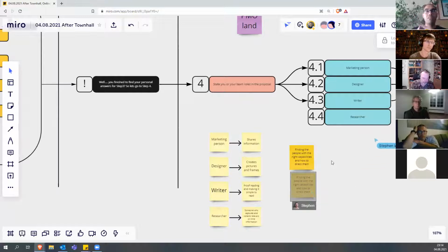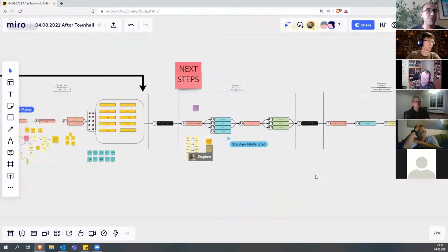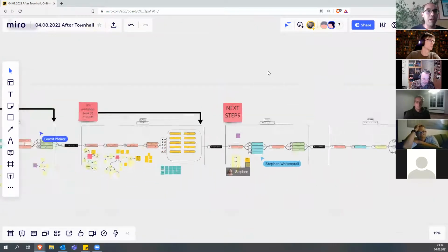Instead of going to the people we need and then trying to fill those roles, I would actually start with a work breakdown structure and start doing an hour estimation for each work breakdown task. The reason I would flip that is you're going to see right away whether or not this proposal is in scope of that budget.